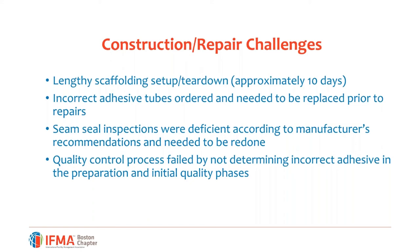The CCB signed up the scaffolding company, they said, okay, great, we'll put you in the queue, we'll let you know when we're going to mobilize. We said, no, that ain't going to work. I spent a day on the phone with them trying to convince them of the importance of this thing, and they finally got it. They sent in their badging request for their 12-man crew immediately, and almost immediately 10 of the 12 were rejected because they had criminal records, including the foreman.